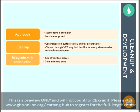Depending on the severity of contamination and the cleanup activities involved, it may be possible to begin construction while remediation activities are underway. A good construction and remediation plan will streamline the process, allowing for a shorter overall timeline. A reduced project timeline reduces construction costs and also allows the project to move into the occupation phase faster, allowing the owner a quicker return on their investment.